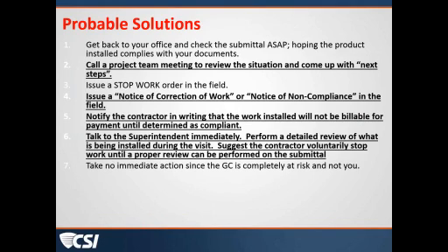No, the one thing that's troubling to me about the scenario that's presented here is when you go back and read the facts as they were given, the submittal was sitting on the architect's desk for 60 days and he hadn't looked at it yet. I would propose that for a waterproofing submittal, 60 days is way too long for it to be sitting on your desk. For any submittal, it's too long for it to be sitting on your desk and you not have looked at it yet. So that's one issue.